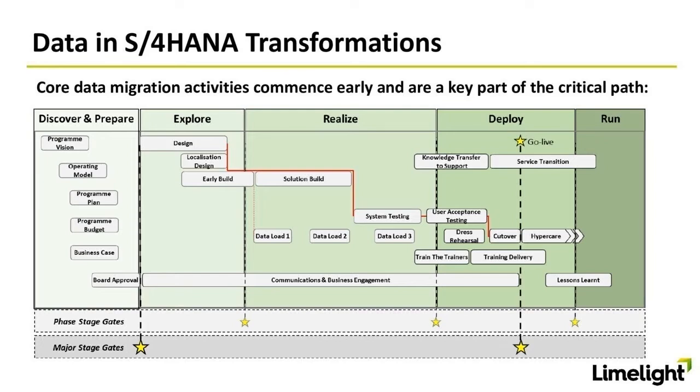So the key takeaway really is data migration starts very early and runs all the way through even to post go live of the implementation, and is wrapped around the key activities to do with the solution build.